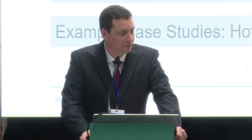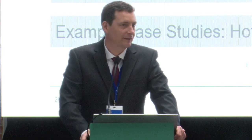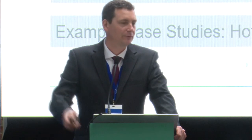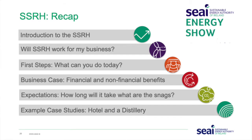So what we talked about today: the introduction to the SSRH, just to let you know what it was. Of course, your first step today is going to be scoping. Look at your fuel bills. For the business case, we talked about the financial and non-financial benefits, and like I said, it's fuel security, the return on investment on the new equipment, and the sustainable product. Snags, they're there. Look, it's going to take a year. If it's your first time applying, it might take you longer. If you've done a couple of applications before, we're getting applications in the door now from design engineers that have done applications before, and they're returning an LOO in 2 months. So allow 2 to 3 months if you're using a design engineer that's already put in an SSRH application.